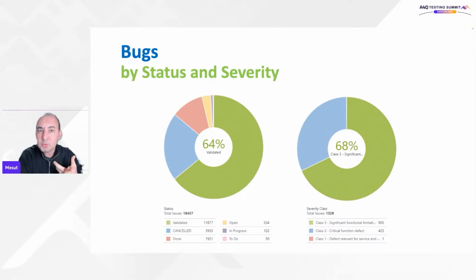If that's a capacity problem or if there are some more critical issues which have to be resolved, so this might be a decision criterion to freeze the new implementation issues, right? If there is a time to stop the development activities, to not implement new features, but first of all get rid of the existing issues or the bugs, then this kind of monitoring activity will help us to take this decision. And similarly, we can understand if we are finding mostly high severity bugs or the low criticality bugs.